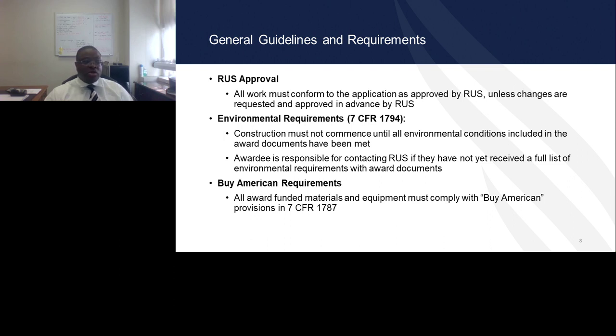But no construction must start until all environmental requirements have been concluded. There will be a letter coming from RUS notifying awardees once all those conditions have been met. And if you have any questions regarding your status with regard to the environmental requirements, I strongly encourage you to consult or contact your GFR or our office.